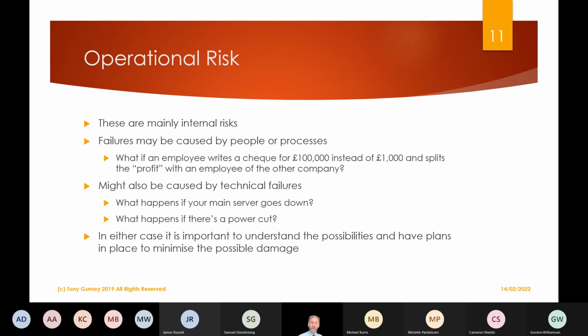If the mitigation is that to stop it, you'd have to buy another server at the cost of £20,000 and have it sitting there. They might take the 4 day downtime rather than the £20,000 hit. The nice thing is, that's not really your problem.